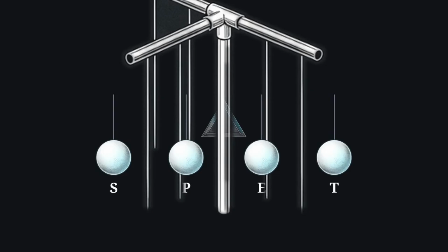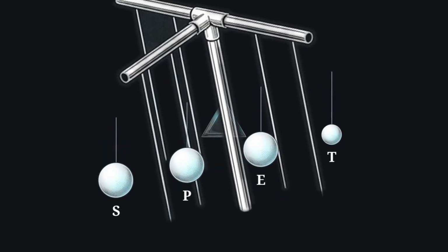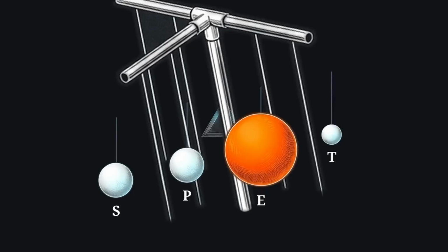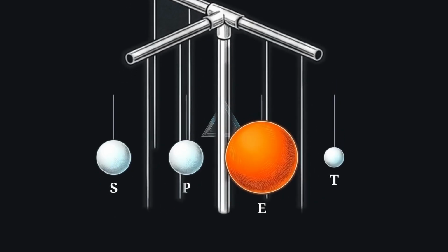These four variables are mathematically linked. Within this system, changing one metric necessitates a shift in the others to maintain the project's balance. If a project is required to finish 2 months earlier, the time variable decreases. To balance the equation, the effort variable must increase, often requiring a larger team and increasing the total work required.